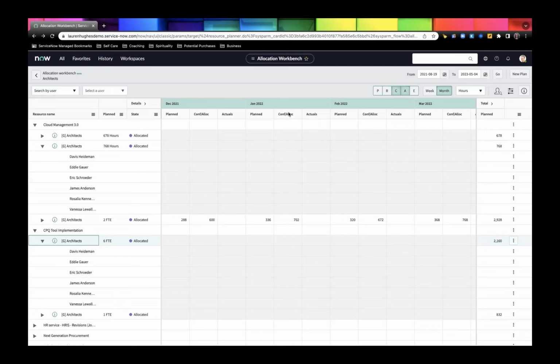So if we reduce the schedule across a group for all those resources and we don't have enough hours anymore, we would need to add another member of the group or reduce the allocation for that group. But yeah, it'll throw a flag up if you change the schedule.